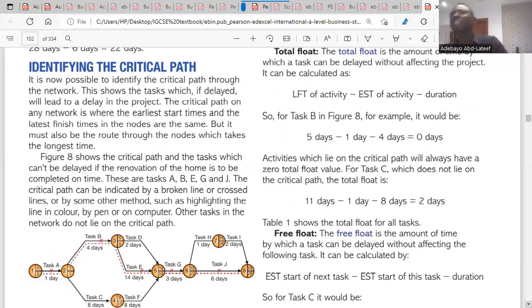So you give each task their timing so that each task has to manage its time. So, there's a time management. So task A has to finish within the next 5 days. Task B has to finish within the next 10 days. And without finishing task A, we can't do task B. These are what we call network analysis.